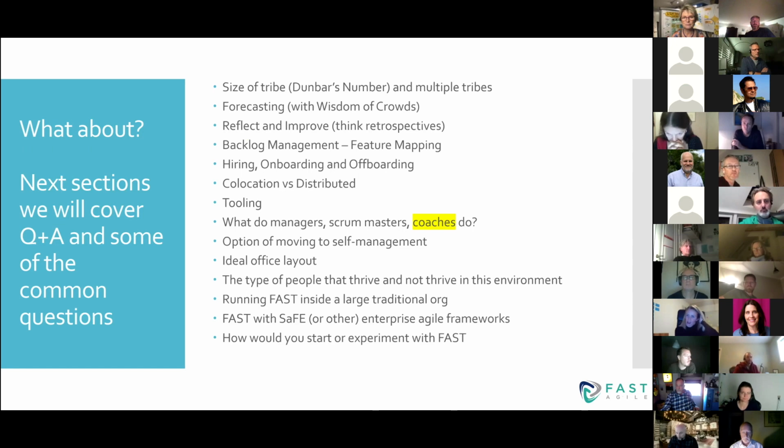So that's an indicator. If that works, I would follow it up with a second one and say, hey, that thing we did with OpenSpace, we're going to have a hackathon, and we're going to use something very similar to OpenSpace, and you actually use FAST agile to have a 1 day, 2 day, 3 day, 4 day, 5 day hackathon. And you get to the end of the hackathon and ask, what did you think of that process? What if we use that as the way we work going forward? Why don't we do a two-month experiment? So that's how I would introduce it going forward.